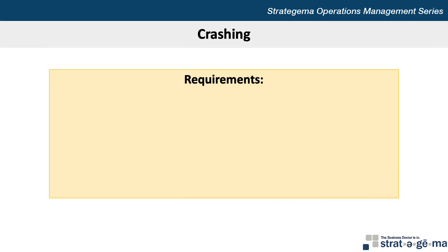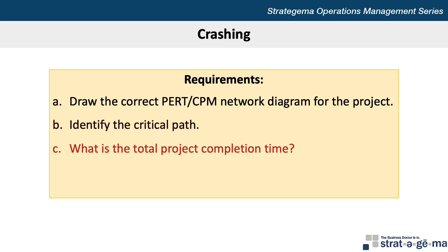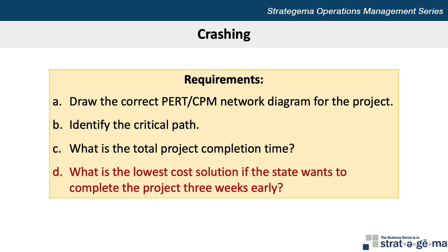There are four requirements for this problem. A: Draw the correct PERT CPM network diagram for the project. B: Identify the critical path. C: Determine the total project completion time. And D: Determine the lowest cost solution if the state wants to complete the project three weeks early.